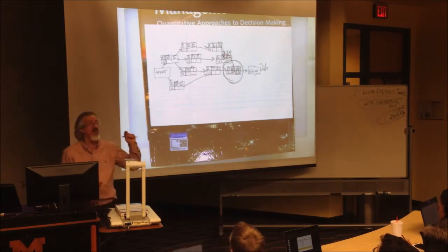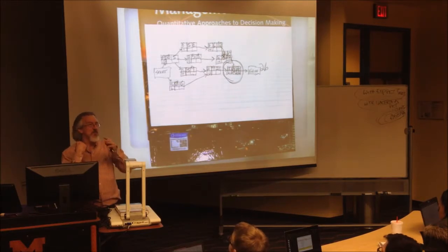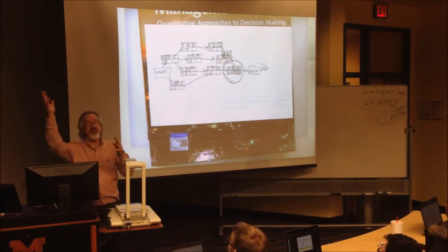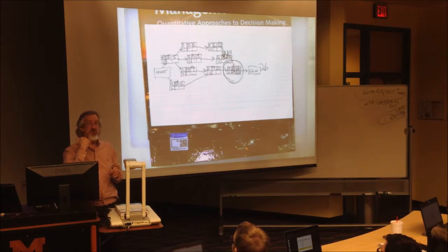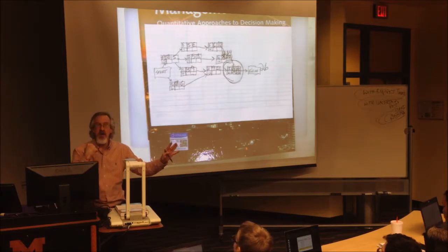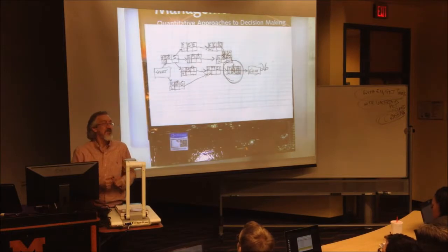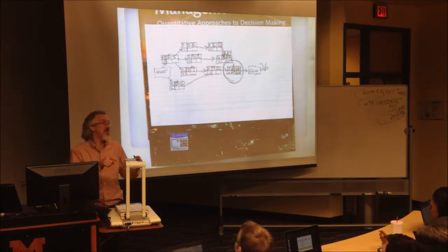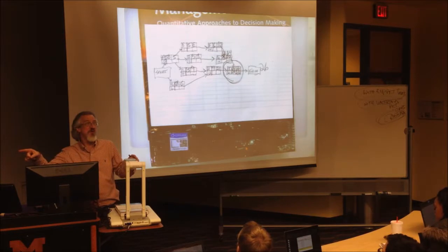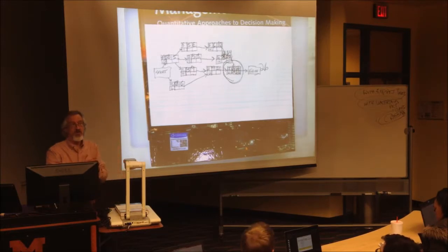When I identify critical activities, I went as far as calling whoever's in charge of the activity, which would be a subcontractor, say drywall. I literally call the person in charge of drywall and I say, look, don't forget, you're supposed to be here in 2 days. If you're not here in 2 days, you're going to cost me a ton of money. Please, are you going to be here in 2 days? Yes. And I learned that I would tell them 2 days, even if they had to be here in 3 days. That's what I learned: you almost have to lie to them to get them there on time, because it will cost you money if they're not.